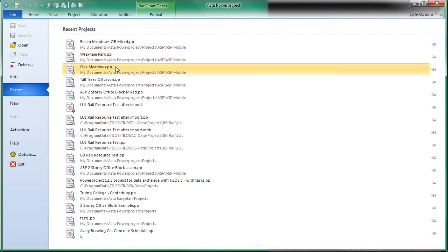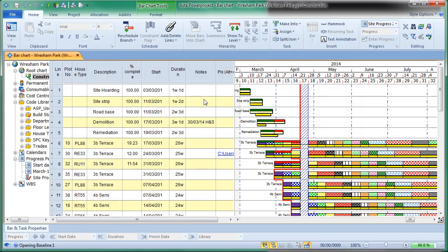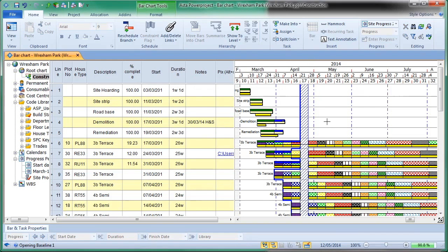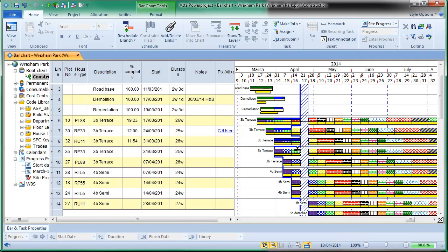So typically these are on a sort of weekly turnaround, and we might not update the program until we've done that every 4 weeks, for example, but we can see where we're ahead and behind schedule. And if we made a mistake, somebody missed something out, we can obviously make that change in Power Project directly, and we can take those values out. So it's not something we can't change later on.